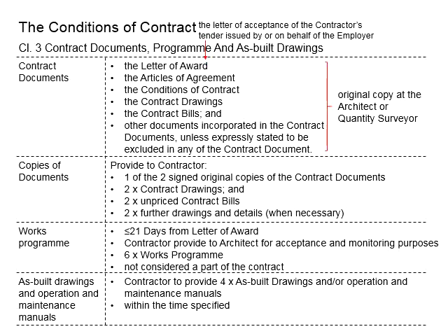In other words, the contractor may not necessarily fully abide by the tentative work program as long as the contractor can deliver the work on time and complete the project before the completion date. The completion date will be a part of the contract. The work program serves as the baseline for project monitoring purposes.